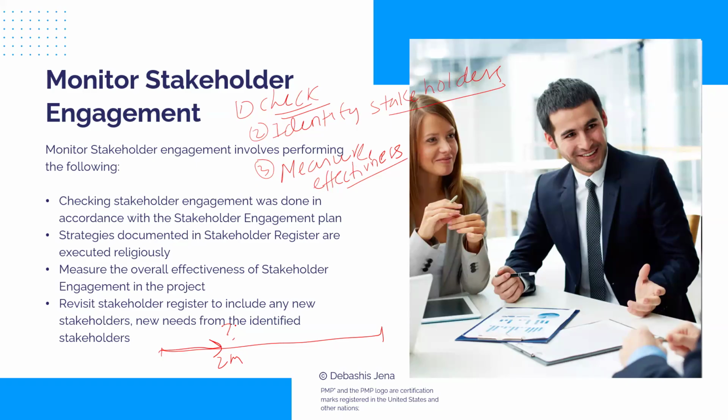You remember we prepared that stakeholder engagement assessment matrix wherein we map the current and desired level of engagement, right? We look for gaps and all. So that is also very helpful to monitor. First time you created it in the planning stage, say there were gaps with 20 stakeholders. I mean, gaps in the current and desired level of engagement. Now I'm checking how many gaps still exist, how many have we bridged. We find 4 or 5 gaps still exist. That's again a good indication, so you could successfully get 15 people to their desired level of engagement.